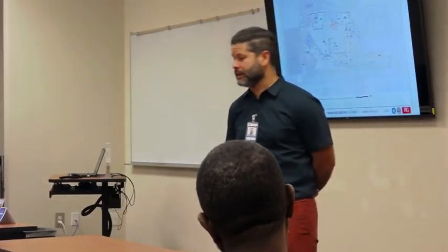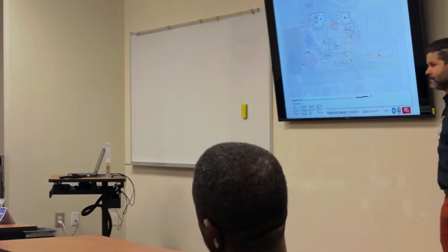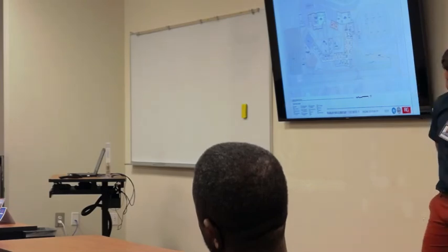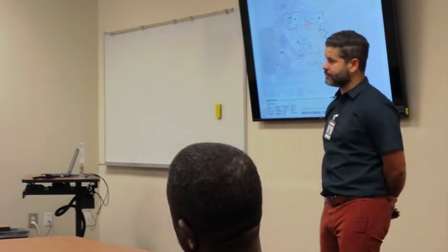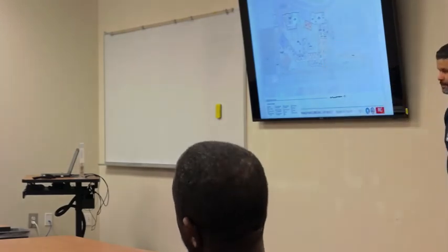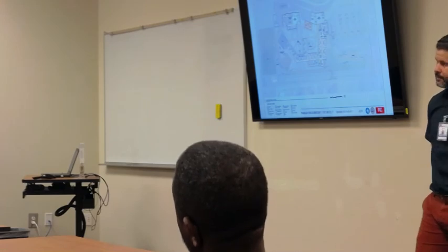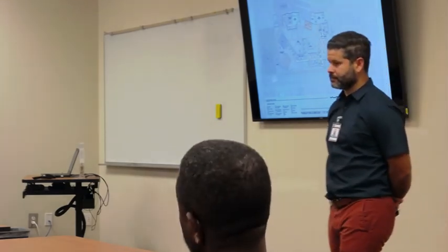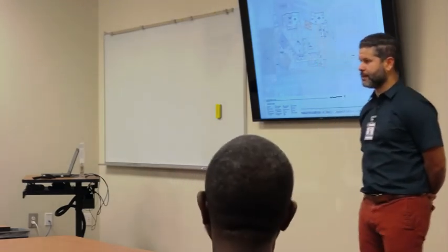No, it's not. And it's not just the building, it's also emergency access, so any road that is used for emergency access also needs to be at that higher level. So it has implications. We did try to get that last remaining building approved for demolition, simply because of that elevation concern. But yeah, that's going to be a civil challenge to design the elevations and the walkways, 1 inch per 12, without having to build the helix to get into that existing building.